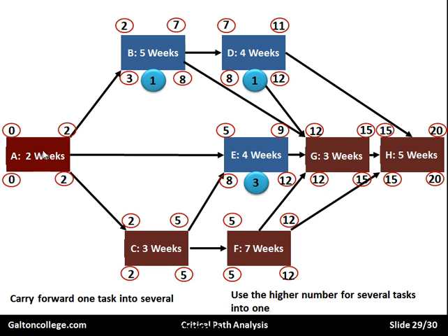So the critical route is A, C, F, and that F goes into there, to the 12, 3 is 15, 15 across. So the critical route is A, C, F, G, H. This is a non-critical route here. We can't have this one, and we can't have those two up there.